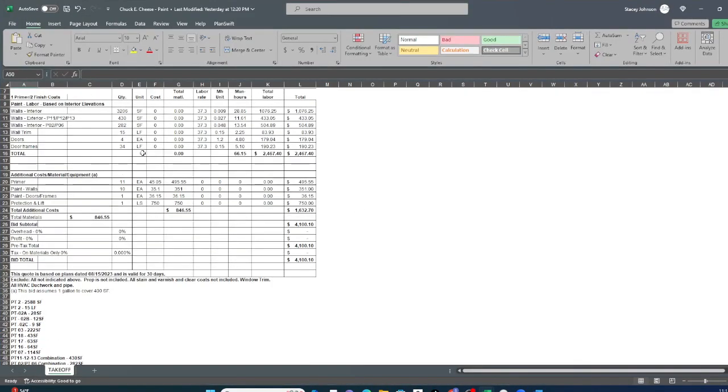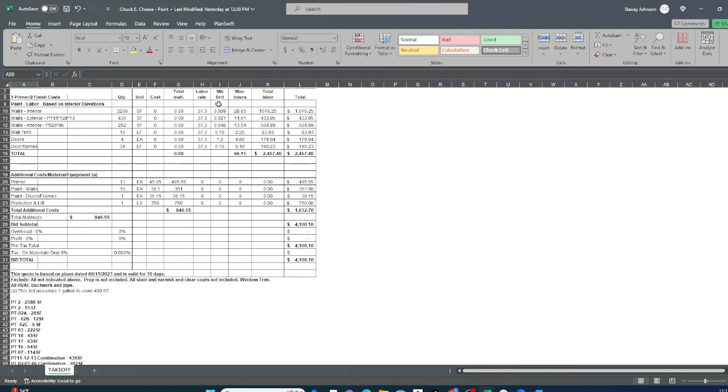So after we did all the takeoffs, interior walls, exterior walls, some of the walls had like strips and where it takes a whole lot more labor. And so in those cases, we increased the man hour units. And this is the time it takes per unit, one unit square foot.